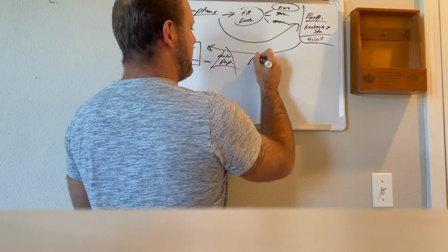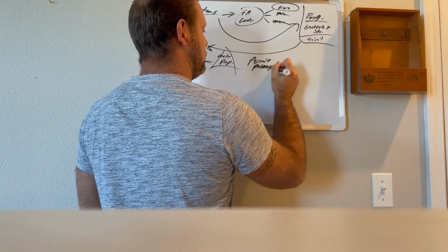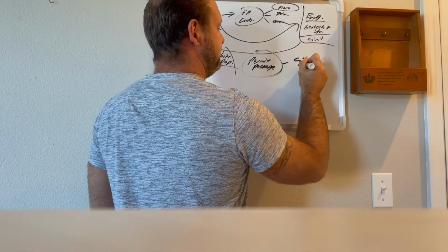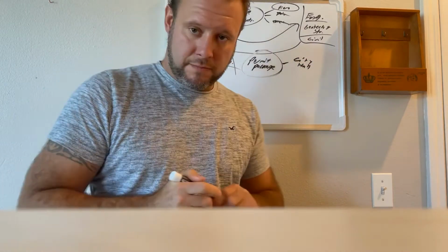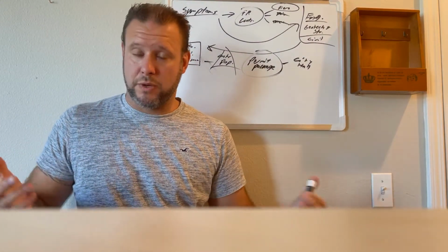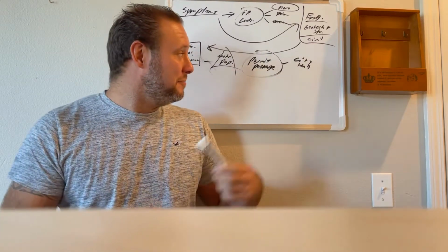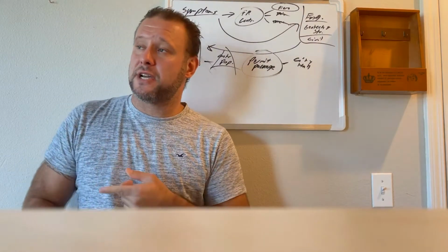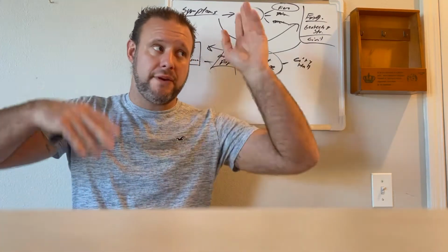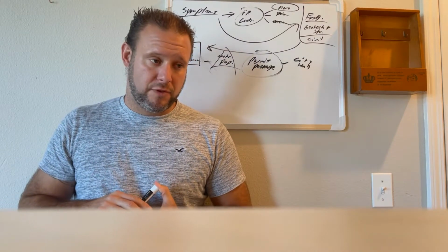So he takes a permit package and sends it to City Hall. Generally during plan check submittal, now the contractor could do that, or the engineer, or you, or whoever. Call me, I'll do it. So that's City Hall. Generally you pay the plan check fees. You've got to pay for a business license if the contractor is doing it. Fill out all the information, life is good, and then this long waiting period generally happens for plan check review.